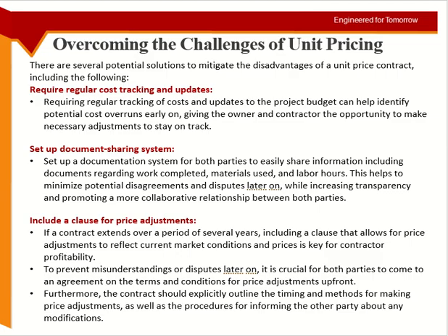Okay, so you don't wait till it finishes. You're getting my point? You don't wait till the end. You do regular cost tracking. I'm talking about the contractor. The client will not do it. The client will do it when the contractor bills for it. So this is the part of the contractor now. He has to do regular cost tracking and he has to detect if there are any cost overruns. And if there are cost overruns, then he should do what?